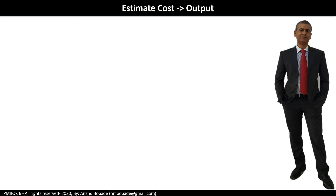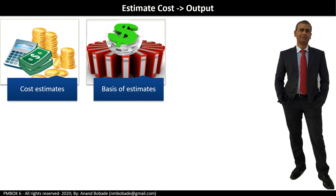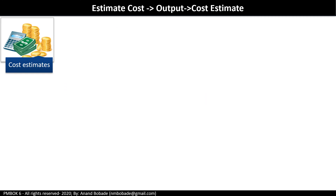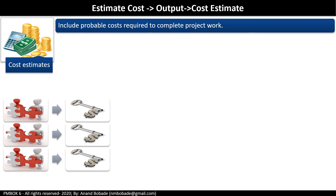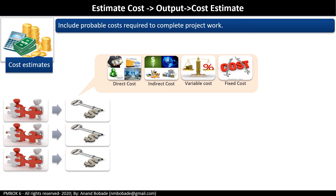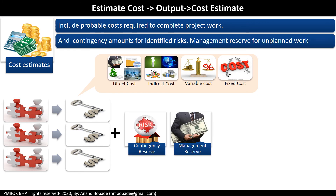The outputs of the estimate cost process are cost estimates, basis of estimates, and project document updates. The key output is the cost estimate — a probable cost required to complete project work — which can be presented in summary or detail form. It includes direct costs (labor, material, equipment, services, facilities), indirect costs, variable costs (inflation, allowance, exchange rate), fixed costs (one-time setup costs), special categories like financing interest charges, as well as contingency reserve for identified risks and management reserve for unknown unknown risks.